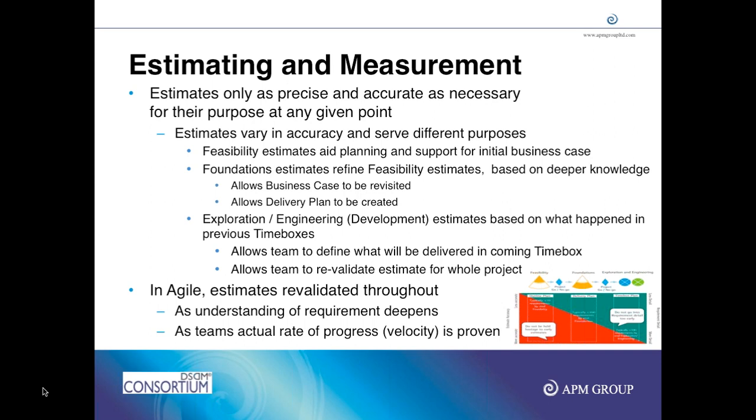So let's see how you do the scheduling of the project. Let's say we are in foundations and you are the visionary and I am from the development team. We had facilitated workshops attended by your team and our team. Now you tell me all the requirements about the website. We listed all the requirements, say, for example, 100 requirements identified. Then I ask you, could you rank them? So you use some logic, like how much value this particular requirement generates in terms of revenues and profits, or is it saving any cost for us, or is it a legal requirement, something like that. So you use some logic and you tell me the priority.